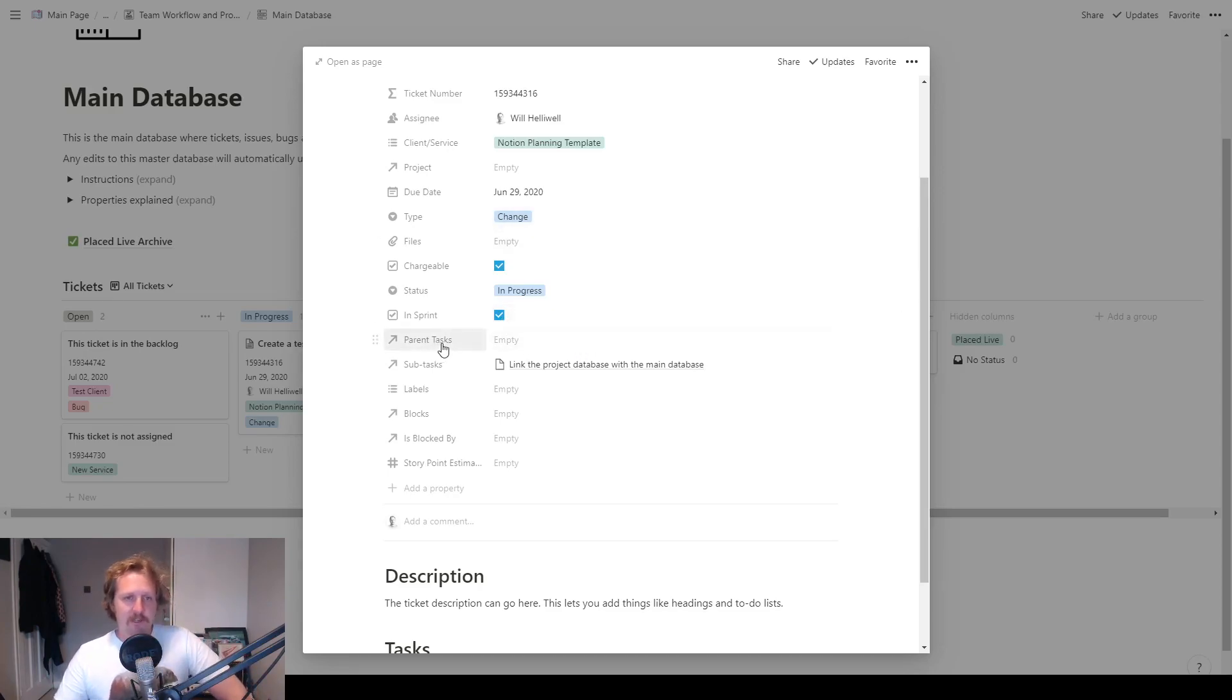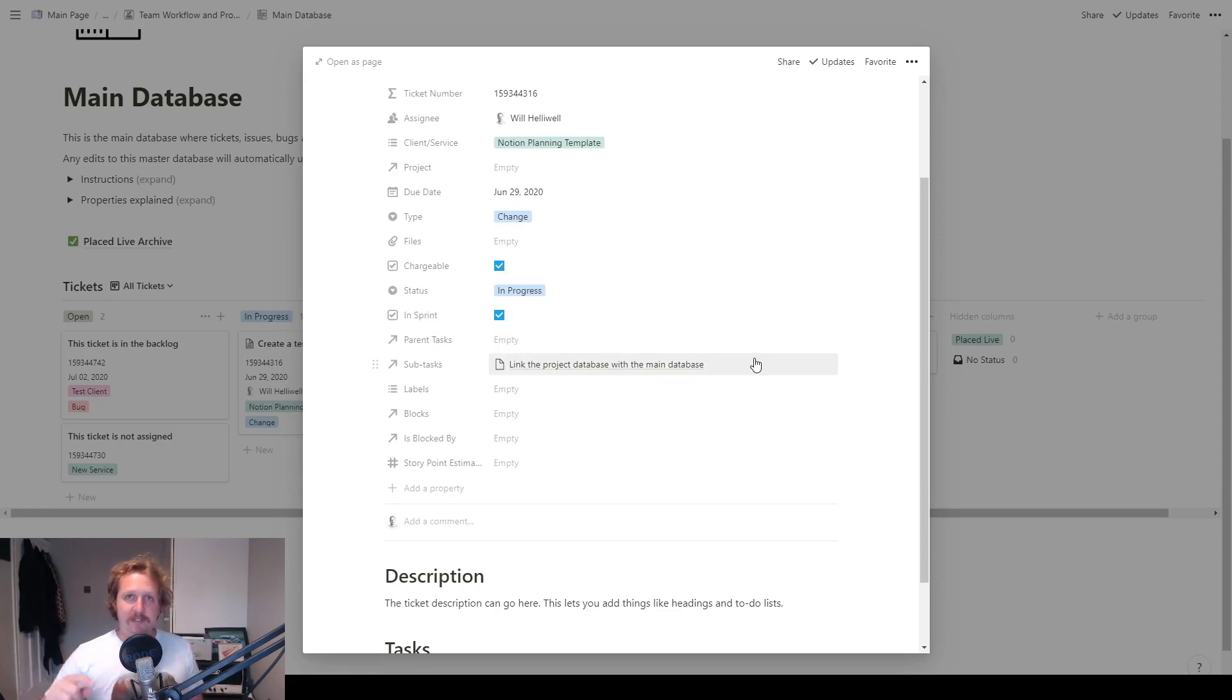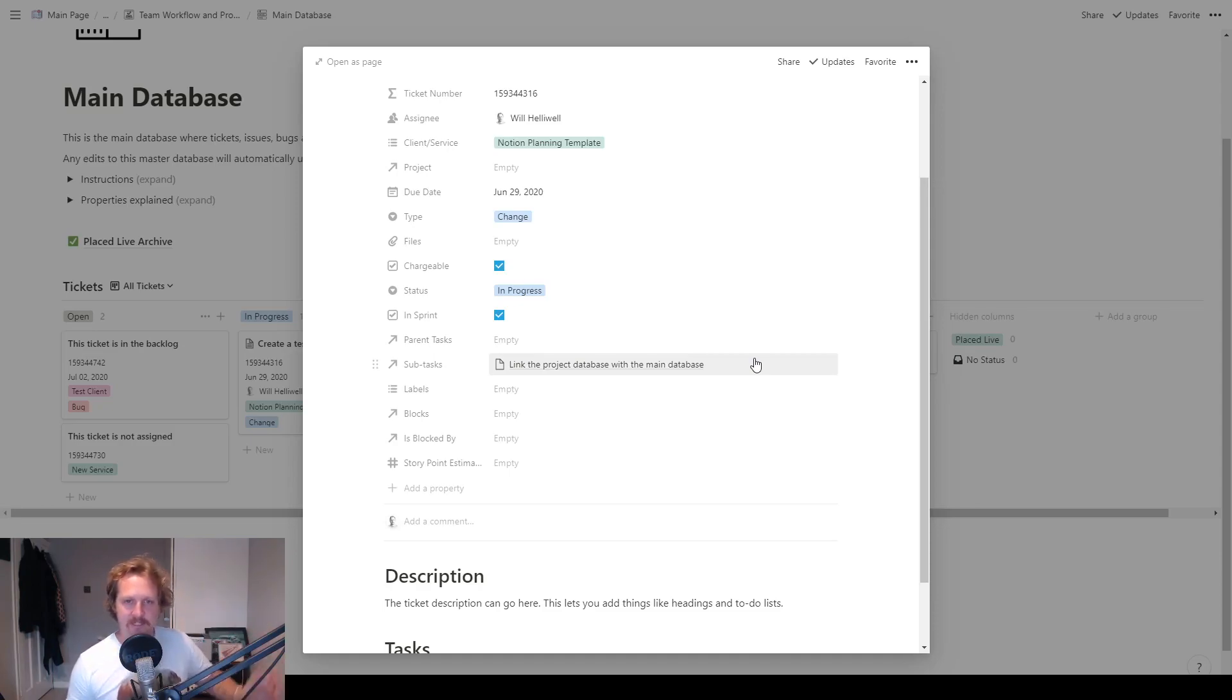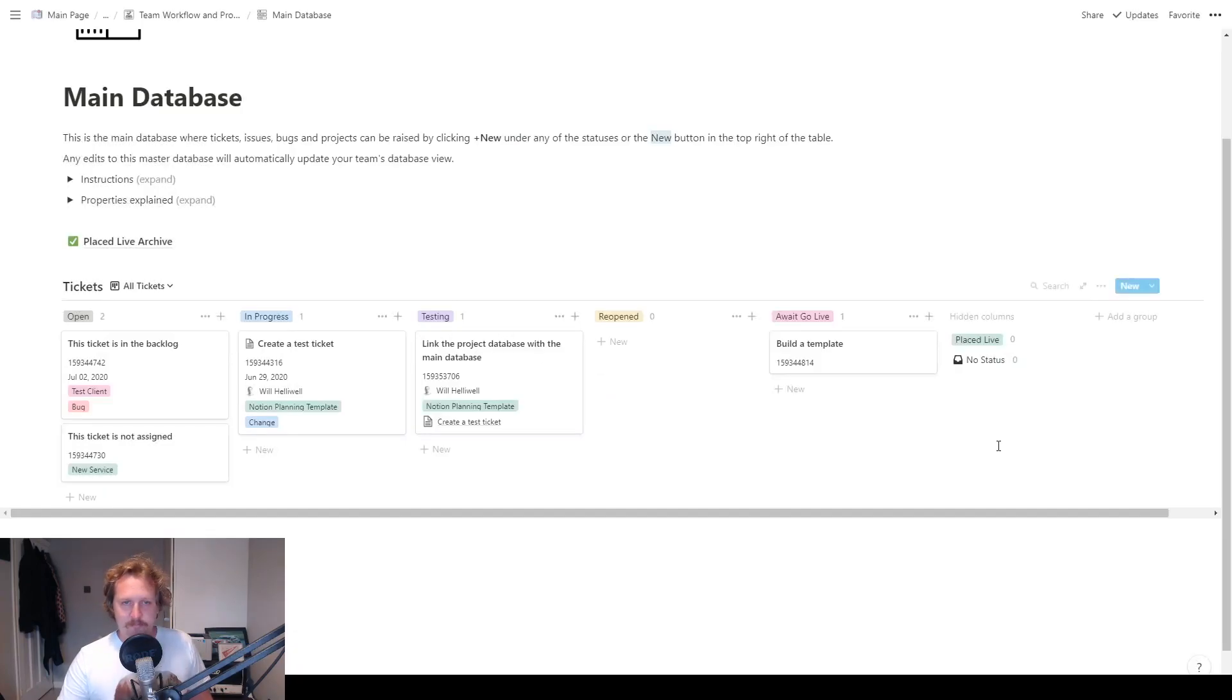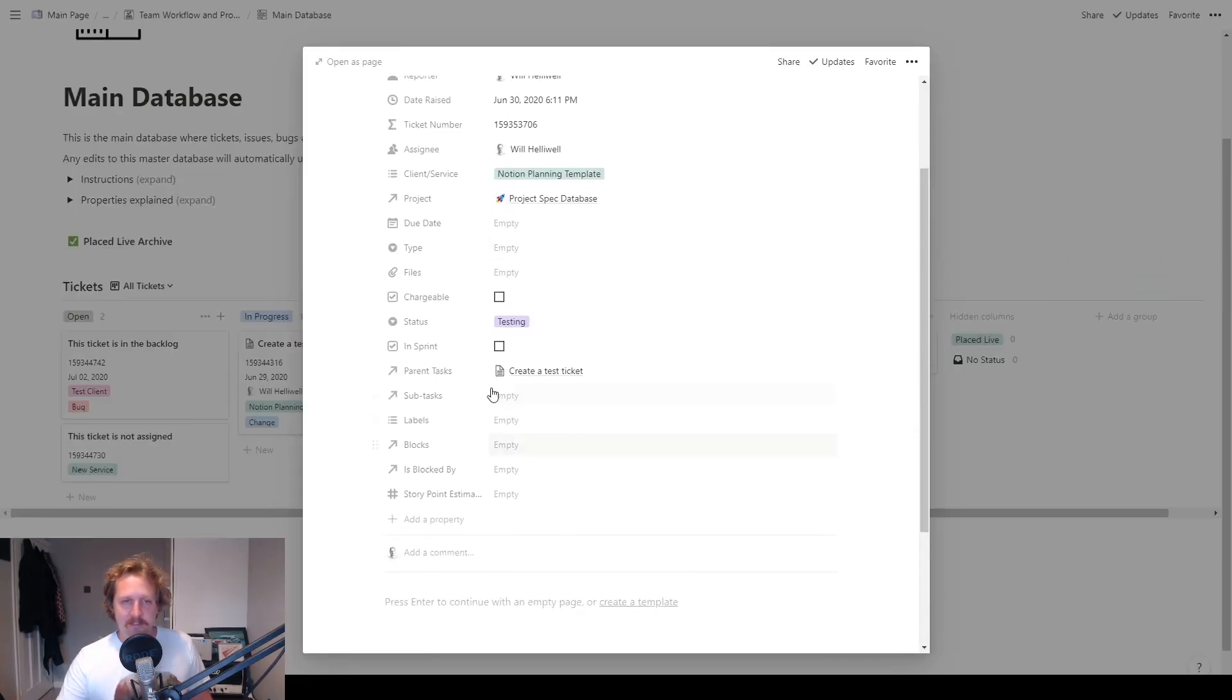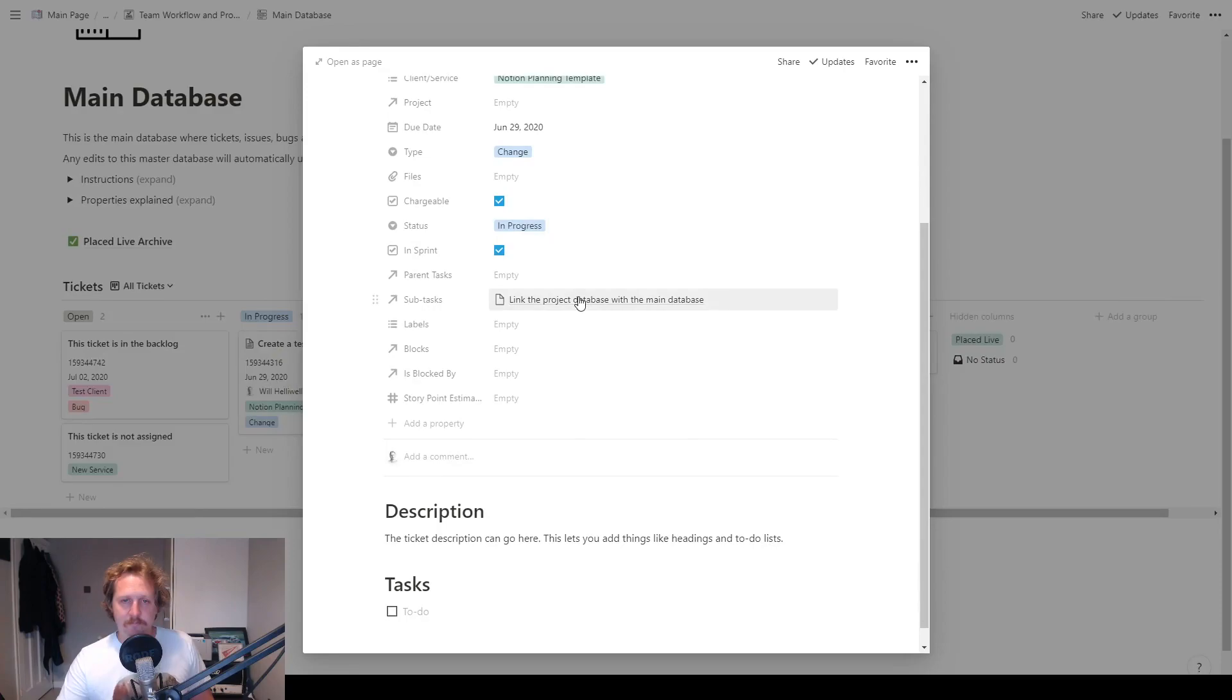Next bit, we have got parent tasks and subtasks. So this is nice. This links two tickets together. So you can have a parent task and then you can add a bunch of subtasks into it. And you know, I've got to get all these tasks done before this main ticket can be sent to testing. If you click on there, you can see it's linked to that one, link the project database with the main database. So if I come out of here, it's this ticket here. And you can see that this one has got a parent task of create a test ticket, which is the one that we were just in. So that's a nice, useful feature.